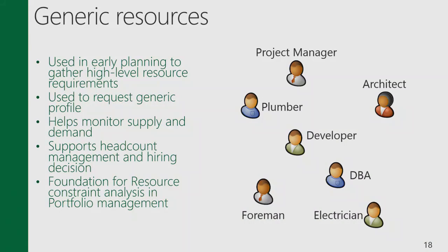And this is also basically the foundation for the portfolio analysis, the resource constraint analysis, which is a little bit more advanced concept, but basically you usually do your constraint analysis on a role-per-role basis, not with named resources.